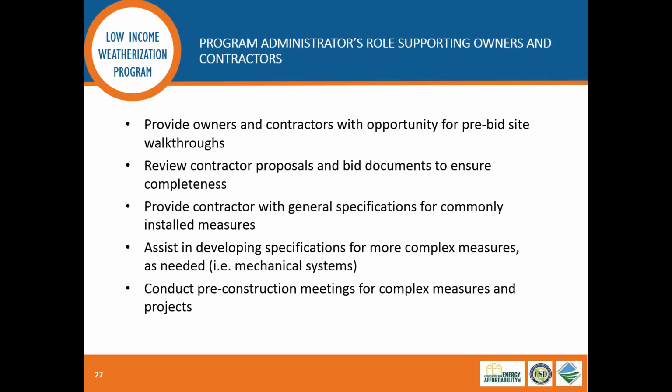So additional roles that collectively AEA will play in both assisting the owners as well as assisting you, the contractors. Especially for more complicated projects where the owner is requesting multiple bids, we can assist both the owner and the contractor with a pre-bid site walkthrough to make sure everybody's on the same page and that the proposals you're providing the owner are apples to apples to your colleagues in the industry.